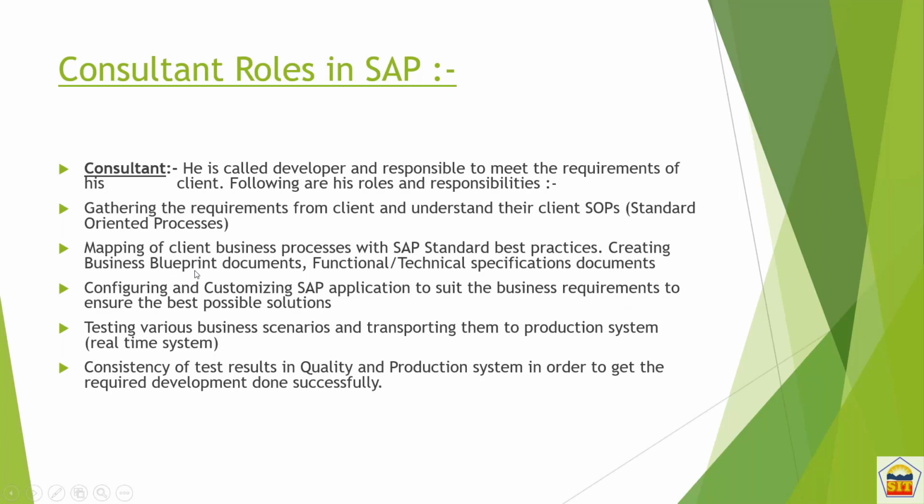What do you understand by the business blueprint document? This is the second stage. The first stage is taking the requirement. Second is the mapping of whatever business processes we have, for which the client has agreed, and also for the customization the client has agreed. So somewhere we need to create a document, and we need to get the document signed off from the client,